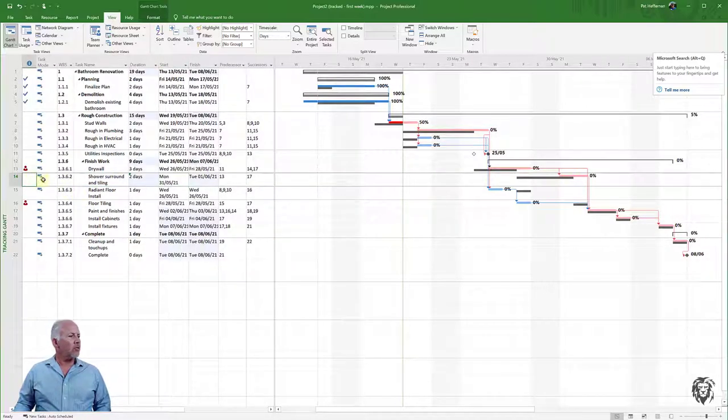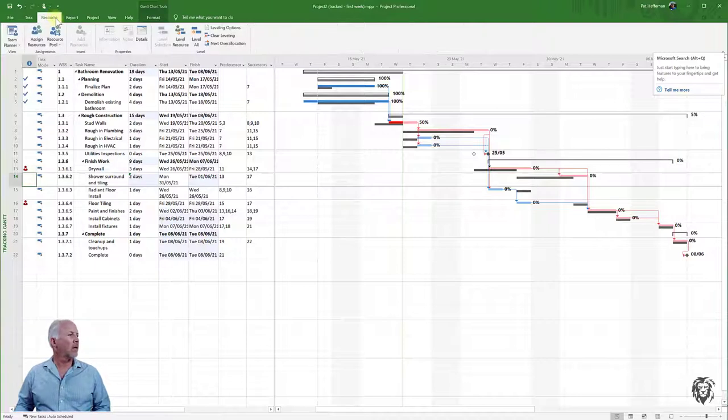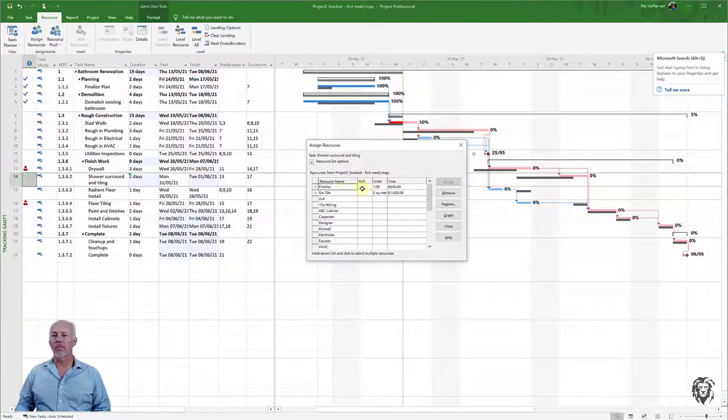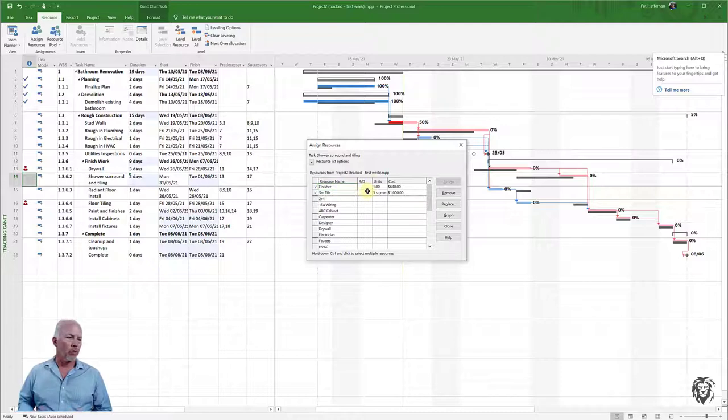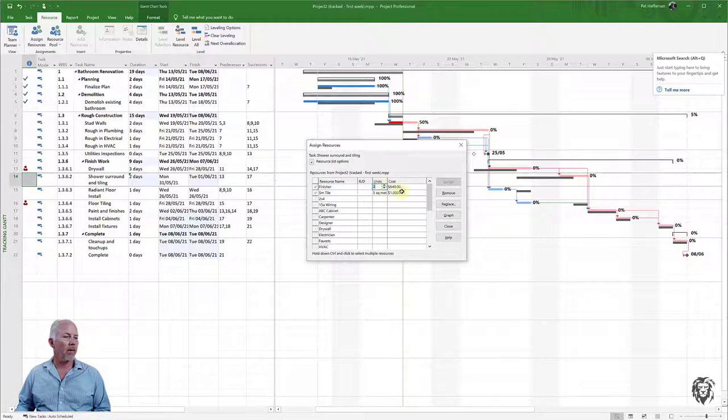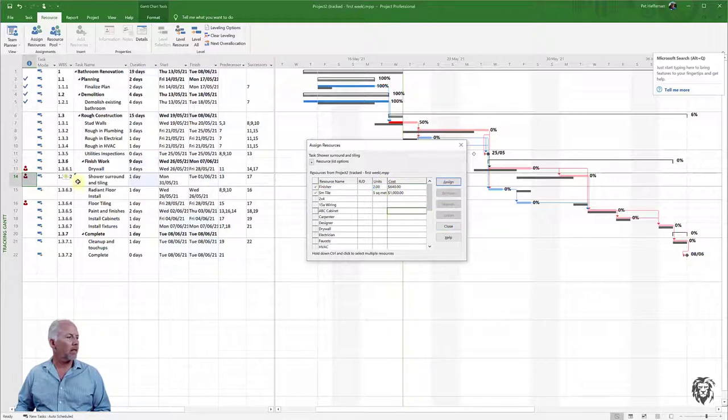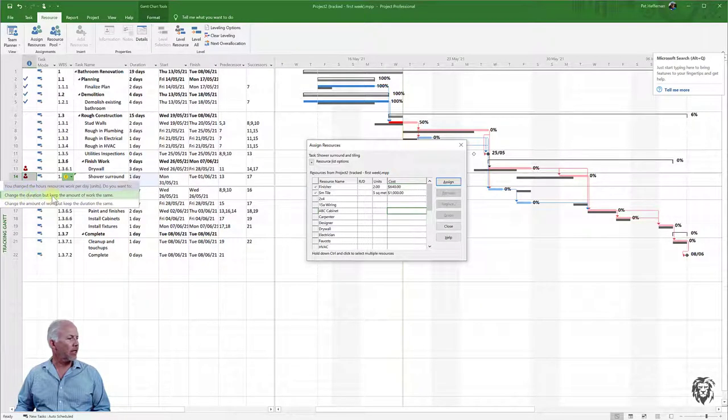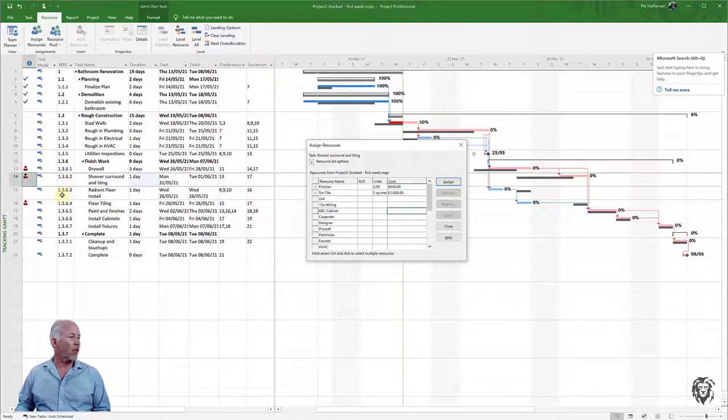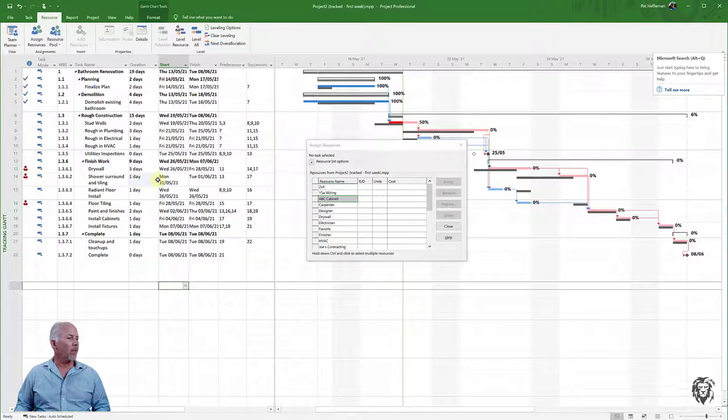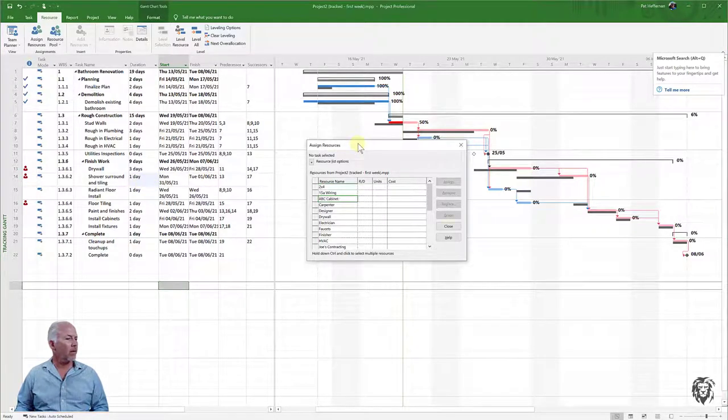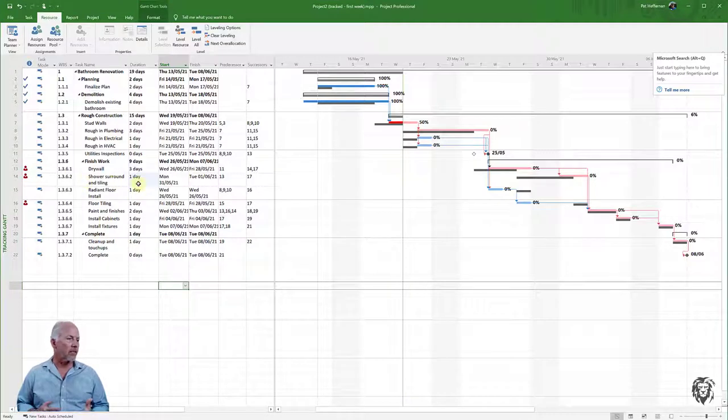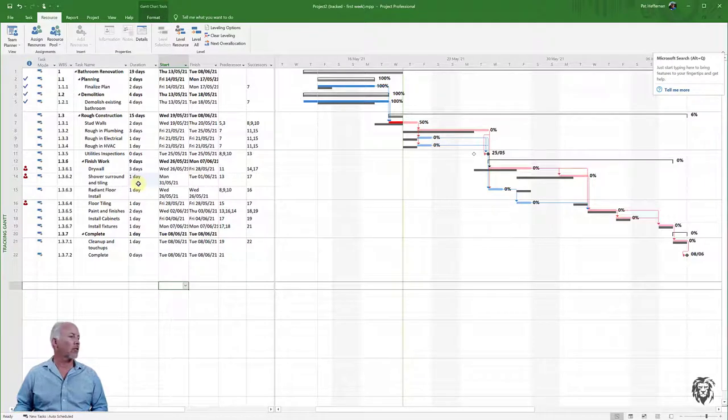We choose the task and bring up its Resource Sheet. It has one finisher working two days, or 16 hours. If I double the resources available and accept that, it says to change the duration to keep the amount of work the same, which is what we want. It goes down to one day with twice the resources. This assumes we're able to acquire those resources from another project to help in the crunch.